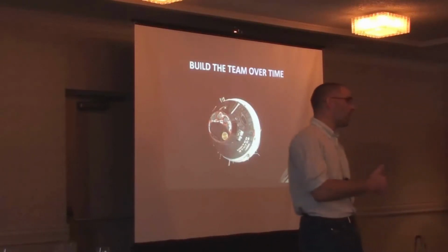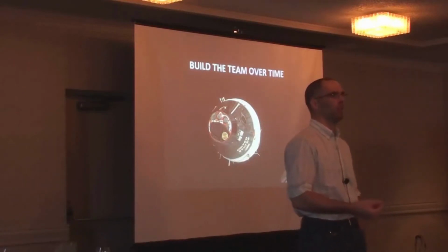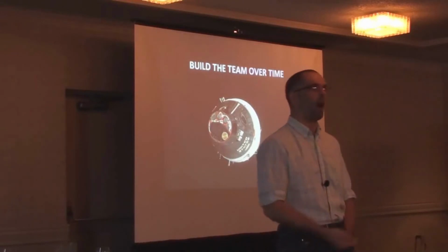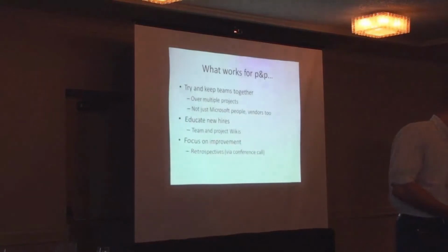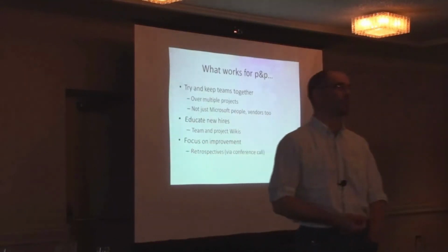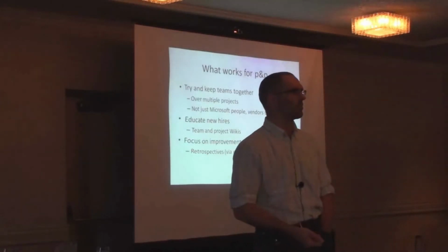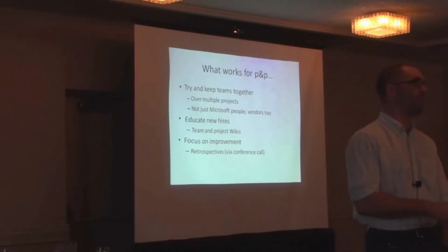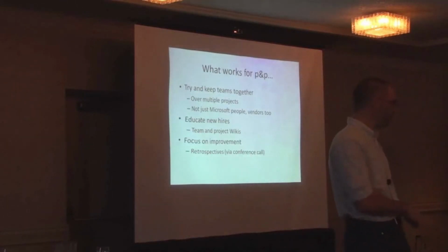One of the challenges you'll see, especially if you're outsourcing work to companies and doing work through contract, is that it's quite hard to get the same people back again. So we expend time and effort trying to keep the same people together over multiple projects. Sometimes that means working quite closely with vendors and subject matter experts to get the same guys in, because we know that as a distributed team we're going to pay an even bigger tax than we would have if we'd been co-located in the room.